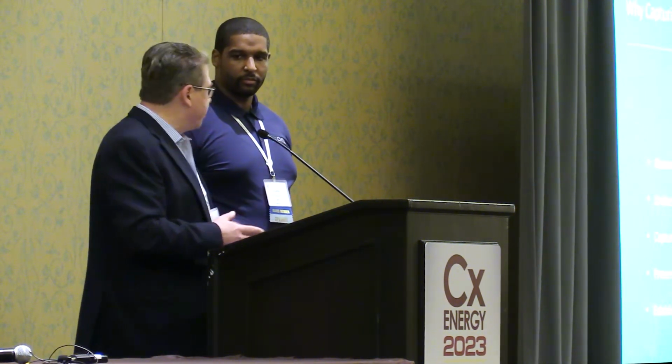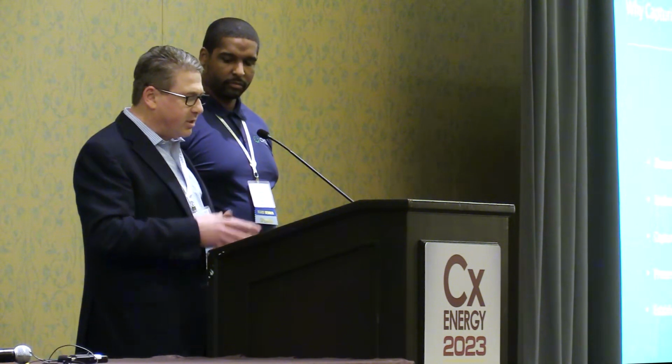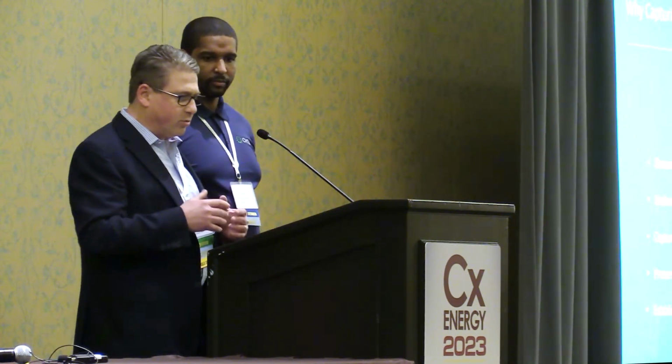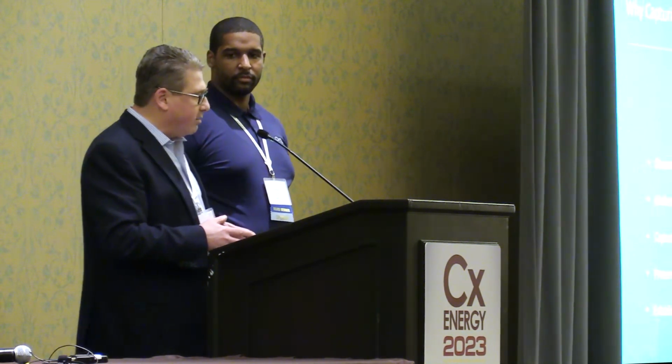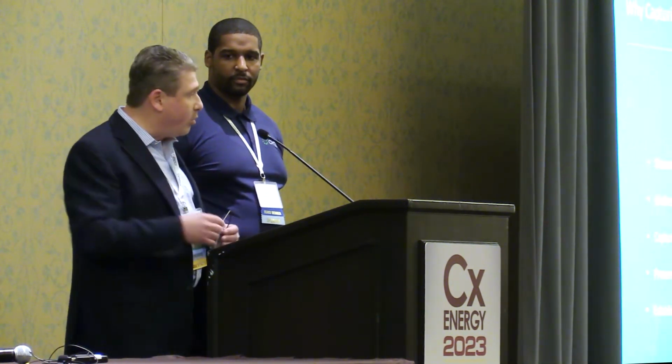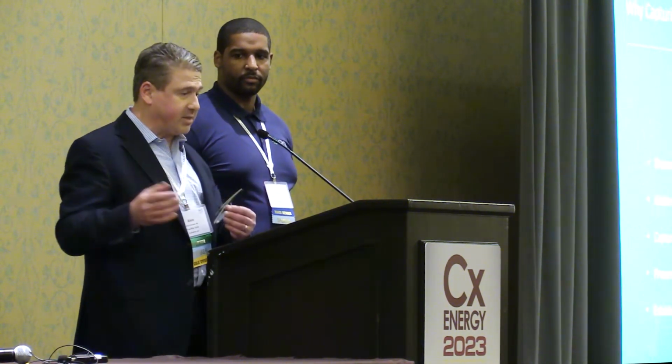Now we also have the commissioning provider. The commissioning provider obviously touches every piece of equipment, looks at every sequence of operation, and finds things that may have been changed or need to be changed or adjusted during the commissioning process. That information is not being passed to the owner. And whatever the requirements are for sustainable operation, speaking of ongoing commissioning, or trending points, other data that's available, is not being passed to the owner.